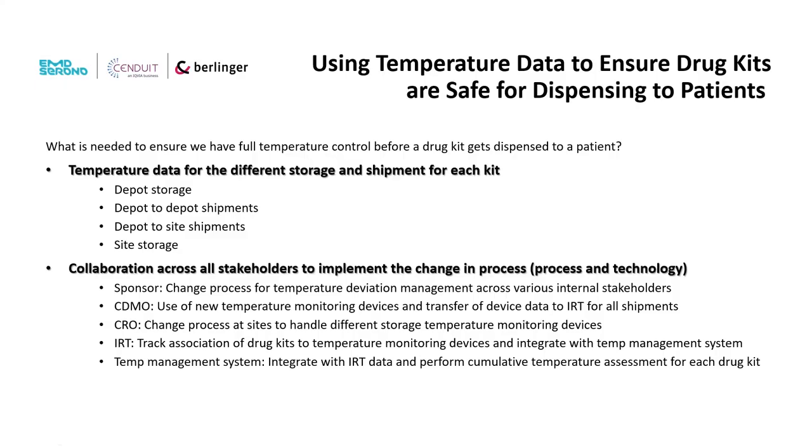So when we started that process, discussing the project with EMD Serono, we looked at how we come up with a technical solution for this. Obviously, what is needed is full temperature control before a drug gets dispensed to a patient. So we need to look at temperature data from depot storage, depot to depot shipments, depot to site shipments, and site storage.